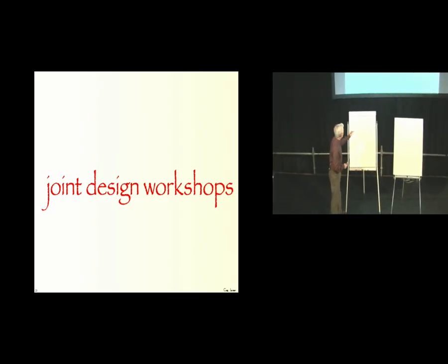So if we've got these individual design workshops for one team, if on the other hand there's, let's say, 9 or 10 teams involved in each sprint, then I recommend a joint design workshop, which happens sometime each sprint, and representatives from each of these teams join it. And these representatives will be people in a community of practice related to architecture and design.